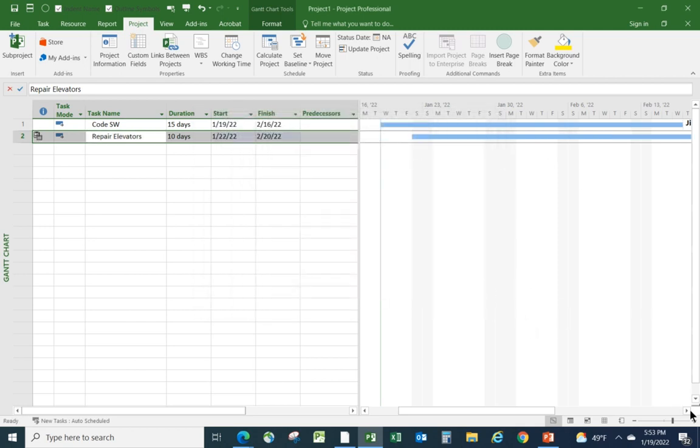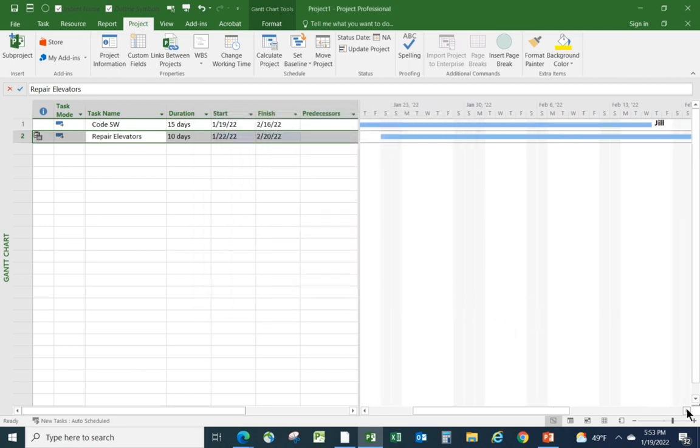And now notice what happens. That activity is essentially only going to be happening at the weekends. And that's how we get the 10 days of work happening. We've got 2 days here, 2 days there, because bear in mind that Monday is a holiday for everybody. 2 days here, 2 days here, and 2 days here. And if you think, well, that doesn't look right, we just need to be able to see over here to remind you that it is indeed right.